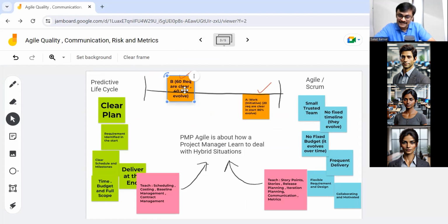So in this case, are we saying that we are okay with the changes, accepting changes? No, we are not. If you are saying the word baseline scope, it means you are not easily accepting the change unless the customer agrees to pay more, in simple words. So we are open, but our contract type is fixed type, so we can't just do it without taking an approval. Okay.